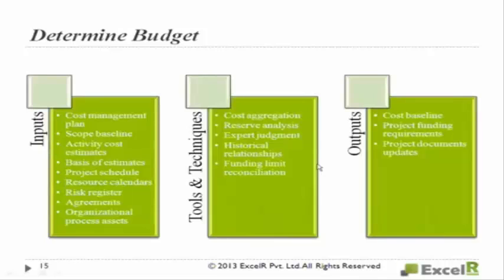Kalyan has asked a question. What about salary versus project resource cost? How to map those two? Can you be more clear with your question? You have to do a mix and match, a balance of experienced and inexperienced people. Normally these salaries will be factored into the project cost only. If you are using a resource for 6 months, 6 months salary will go into the project cost. So if the project budget is very less, then it will be a big challenge. That is the reason you will have a mix and match.